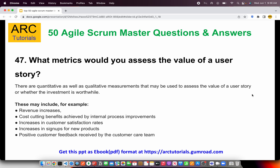What metrics would you use to assess the value of a user story? There are quantitative as well as qualitative measurements. Some user stories can be mapped directly to revenue — how many conversions, how much revenue has this feature brought in? How much process improvement has happened? How satisfied is a customer with a particular story's deployment? Has it added new signups? Has it increased positive customer sentiment? Some stories you can put a number to, like how many people signed up or became paid members through this feature; others are measured qualitatively through sentiment and satisfaction rates.